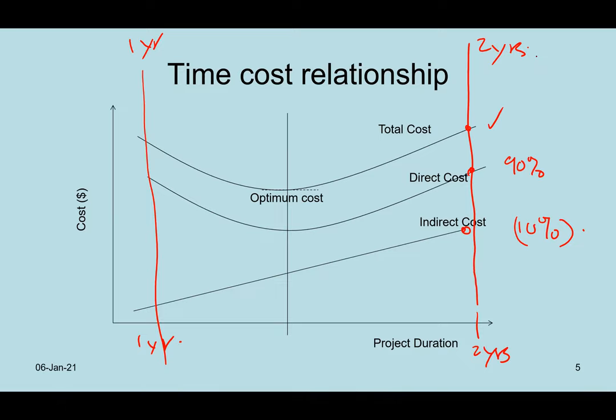But for calculation purposes, we call it fixed. But if you translate that into project duration, the longer you stay, let's say instead of studying in UTM 4 years, you spend 5 years or even 6 years because you take a few subjects per semester, how about the indirect cost? For sure, you need to rent the house longer, then you have to pay more. So that's why this graph indicates a linear relationship with regard to the duration of a project. The longer you stay, for sure, we need to extend the renting period. We need to pay utilities, etc.